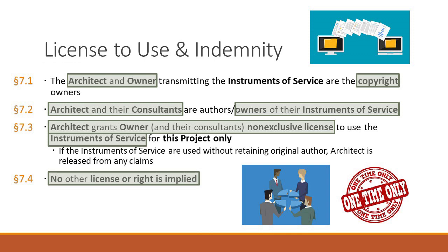I can't give these drawings to a friend of mine. I can't give these drawings to some other company. If I leave the company I'm with and go somewhere else, I can't give them to those. For the project, I can only give them to the contractors and the subcontractors and my third party, my kitchen designer, and I only have a license for that. That's it. And if I do any of those, if I do go to phase 2, if I take the drawings for myself, if I give them to somebody besides the contractor and the subcontractors, this says here, any unauthorized use, so all those are unauthorized, shall be at my own risk.